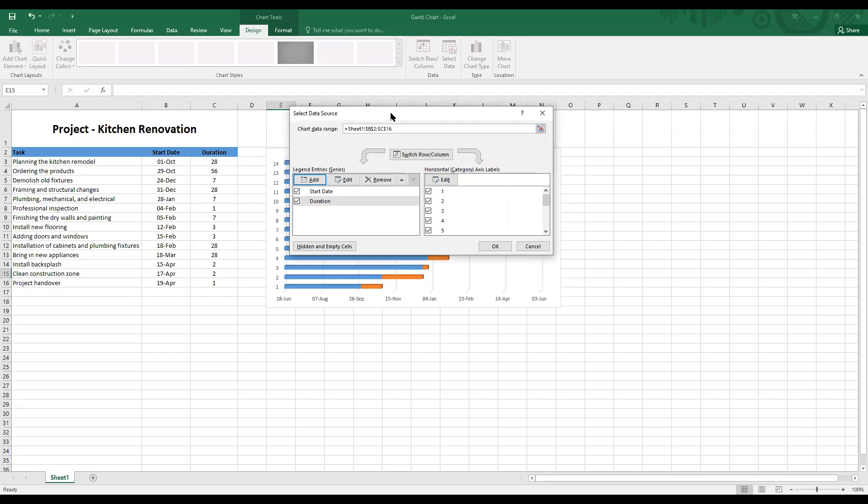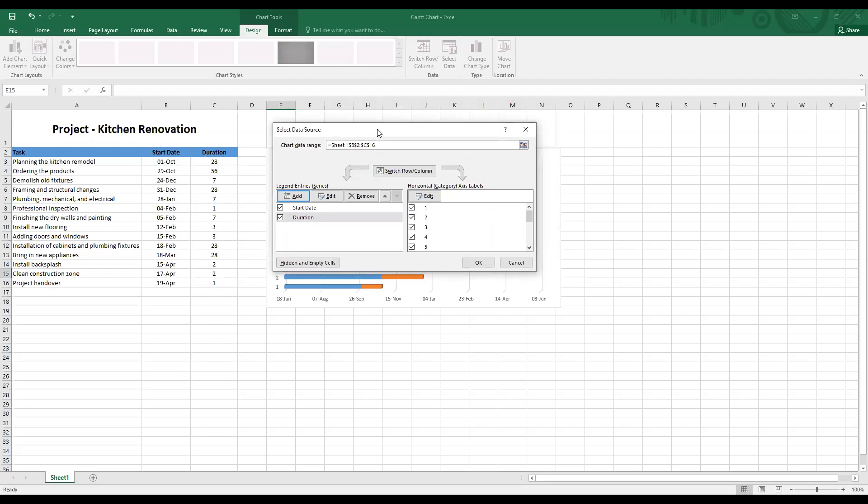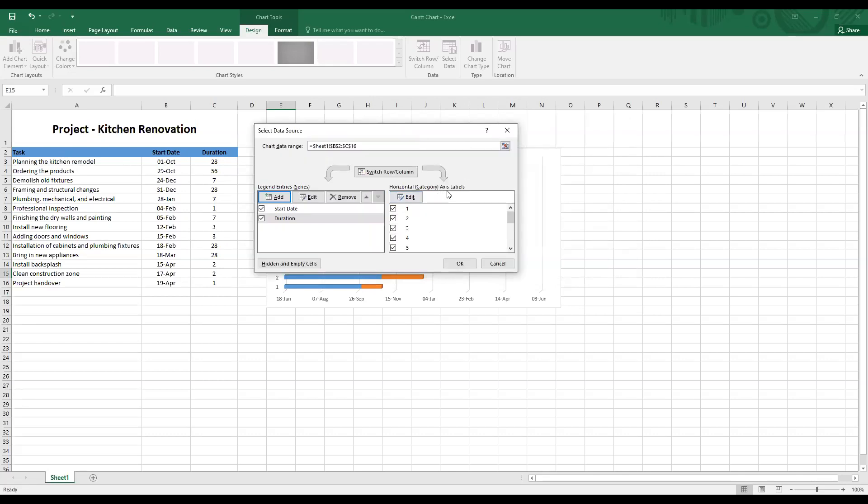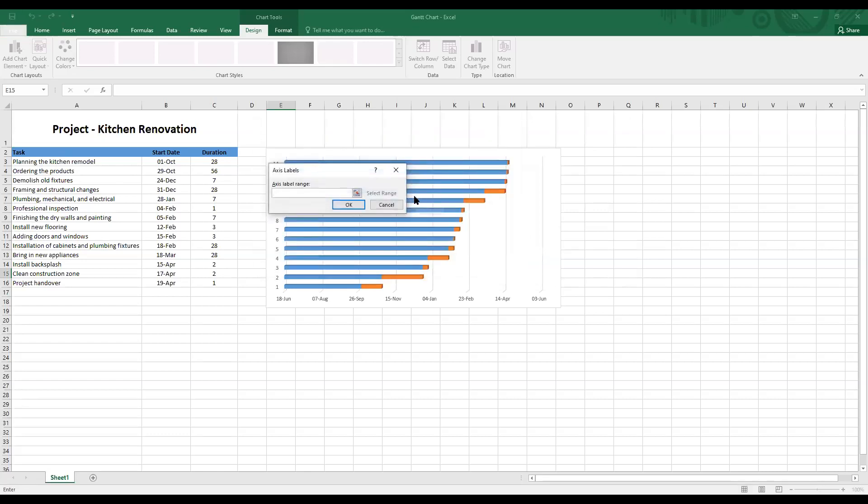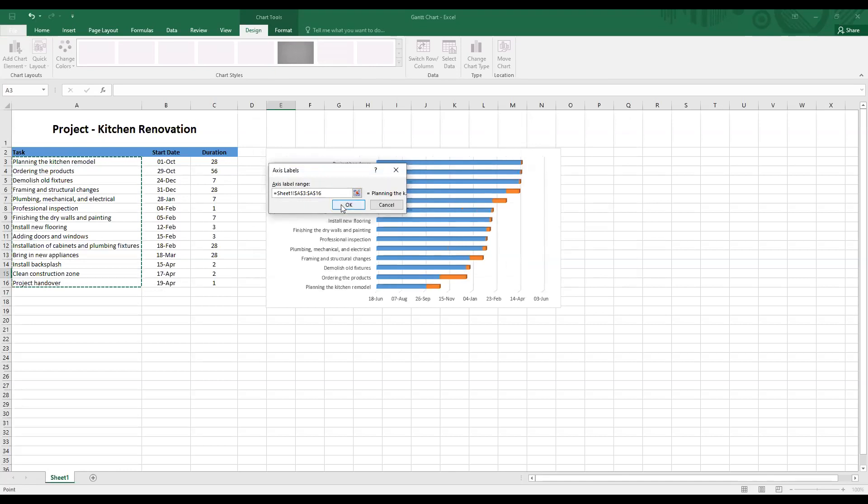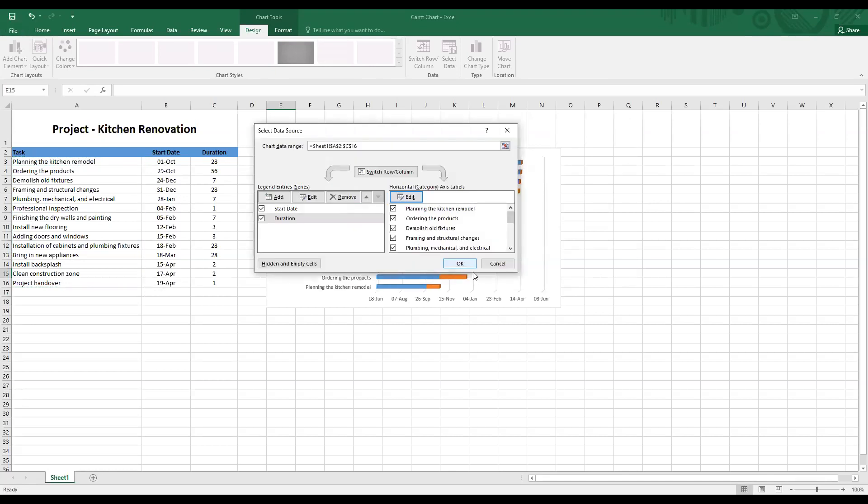Finally, I want to now change the labeling of this vertical axis. Remember, in a Gantt chart, the vertical axis represents the tasks. So instead of having these numerical figures that really don't reflect any meaning, I would want to rename the axis with the title of these tasks. For this, click on edit under horizontal axis labels. And then under axis label range, highlight from task 1 all the way to the last task. And click on OK. Click on OK again. There you have it.